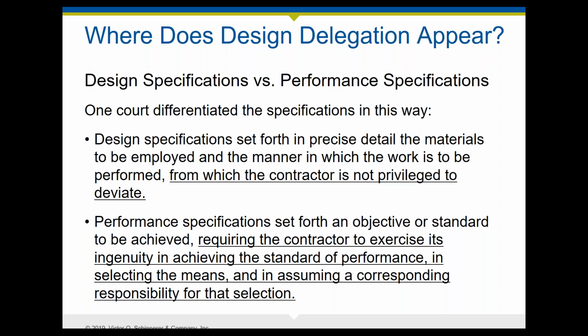The performance specifications really give a different kind of standard. And that means the contractor has to not only look at its own means, methods, techniques, sequences, and procedures, but it assumes a special responsibility for meeting the requirements of the performance standards.